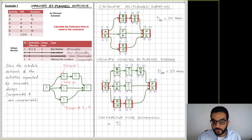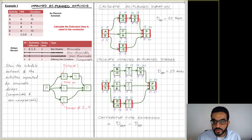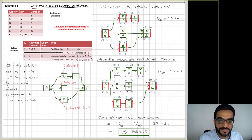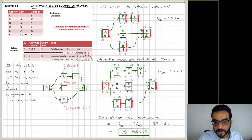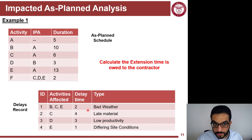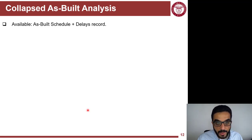After the forward pass on the impacted as-planned schedule, the total duration comes to 23 weeks. The contractor is entitled to a time extension equal to 23 minus 20 = 3 weeks. This means the contractor won't pay liquidated damages for delays up to three weeks. Any delay beyond three weeks would still be subject to liquidated damages. That was the solution applying the Impacted As-Planned analysis.